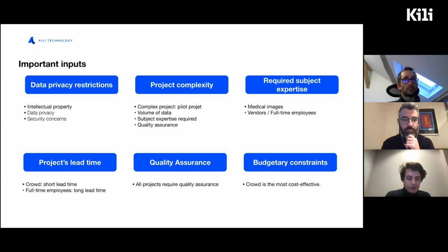Yes, so just one note I had on that is for projects with a high level of complexity, something that is actionable is to understand whether the task is only doable by experts, or can it be taught through training to the team? Because it will then depend on if you need to onboard full-on experts, or if you can have only a couple or few of them spending time training and reviewing the data on that task, thus leveraging and maybe helping you scale your team and your operations.